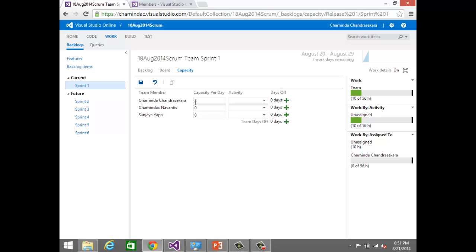Now this is per day how many hours you can actually put in for the work that is defined in the backlog, right? So if you are defining backlog for even items such as facilitating things, like finding the device and bringing it in, right? You can consider those hours as well. But normally, advice is in TFS always try to focus more on development. If you have that kind of requirement, like find the scanner device and bring it here, that should be an impediment or issue, right?